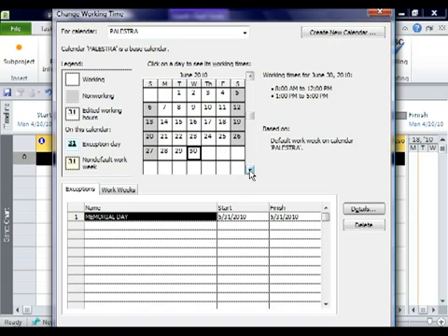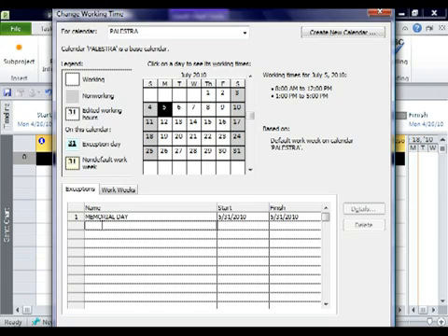I always try and take my calendar out at least 3 months past when I think the project is going to end. That way I don't have to remember to do it later on. Also, the 4th of July this year actually falls on a weekend, so most companies actually give you the 5th off. So I'm going to type 4th of July, even though it's the 5th, and hit enter. Now the 5th of July is non-working, and so on.